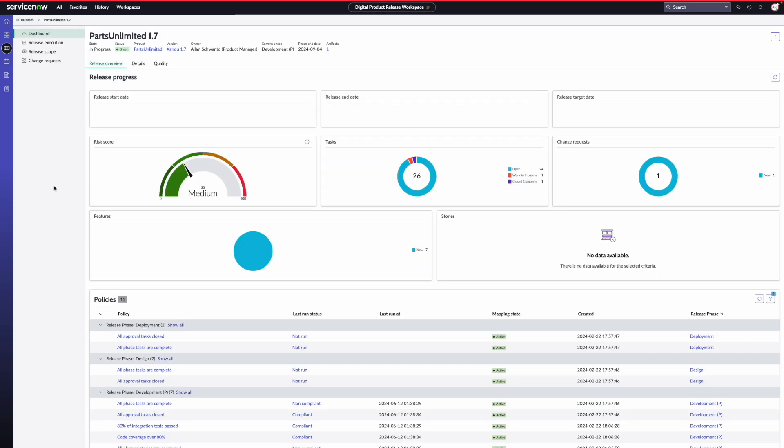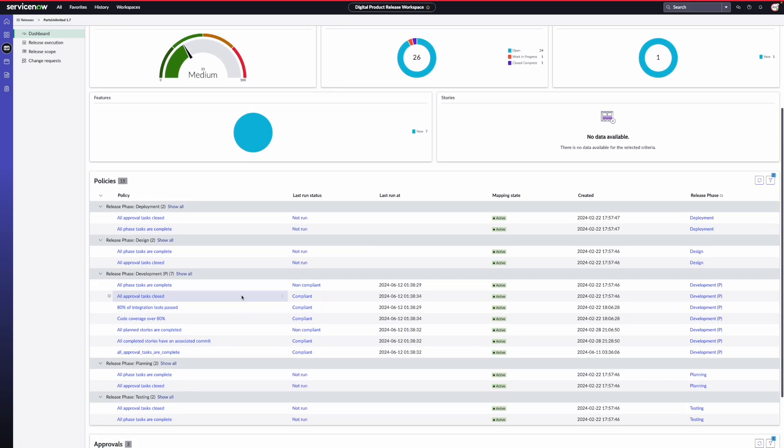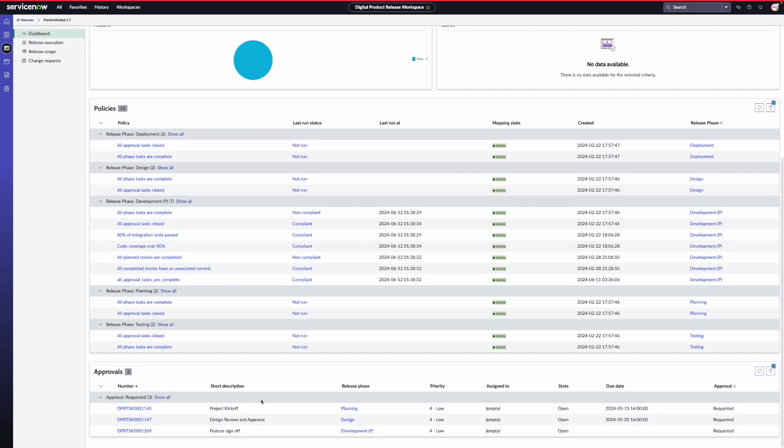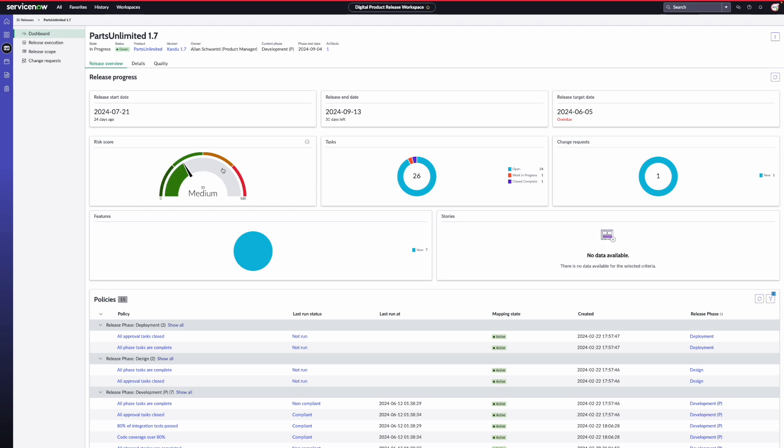When you click on the release name, you are taken to the release dashboard page. The dashboard page provides an overview of key details, including important dates, the overall risk score, tasks, change requests, policies and approvals. The risk score is calculated based on a combination of overdue tasks, failed policies and the release end date.